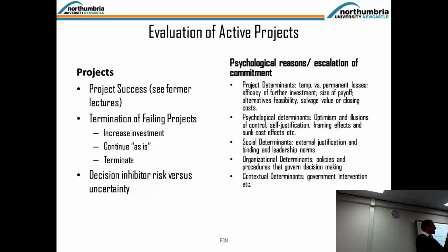And it shows the inherent dilemma that if you're a project manager and you do the feasibility study or you define the project, you are phoning up the right people, you're getting your costing right. But with mega projects, what's often not factored in is the sheer scale of it. And in mega projects, there's actually a formula promoted by a colleague from Oxford that insists every mega project should have a factor of 1.5, a factor of 150% being added to the costing because of scale. So they have actually a refined view there.